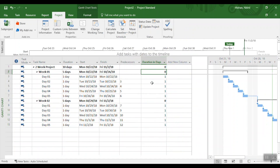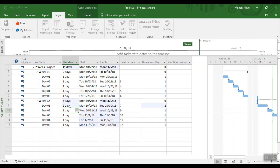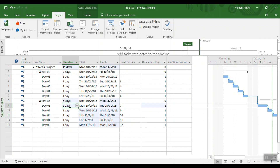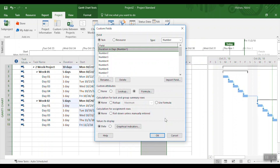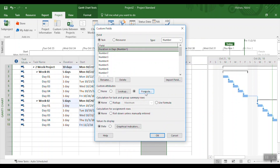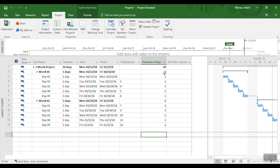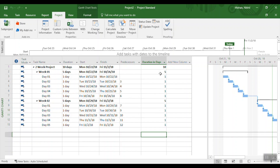Whatever you see in the Duration in Days column should match what you have in the Duration column. For example, if you change a task to two days it should automatically show 2, and the summary should show 6 instead of 0. If the summary shows zero, it's because we haven't applied the formula for the summary task. Go back to Custom Fields, and under Summary Rows, select 'Use Formula,' then click OK.